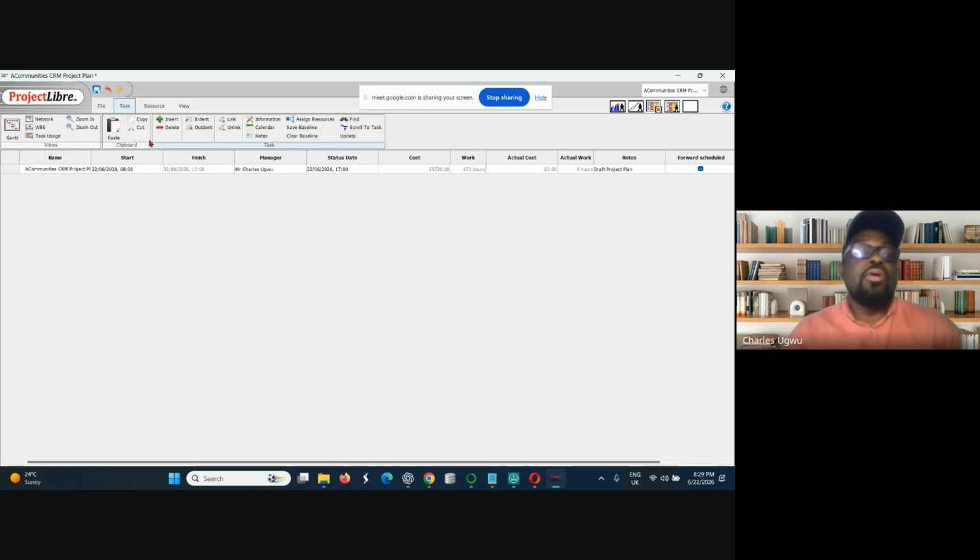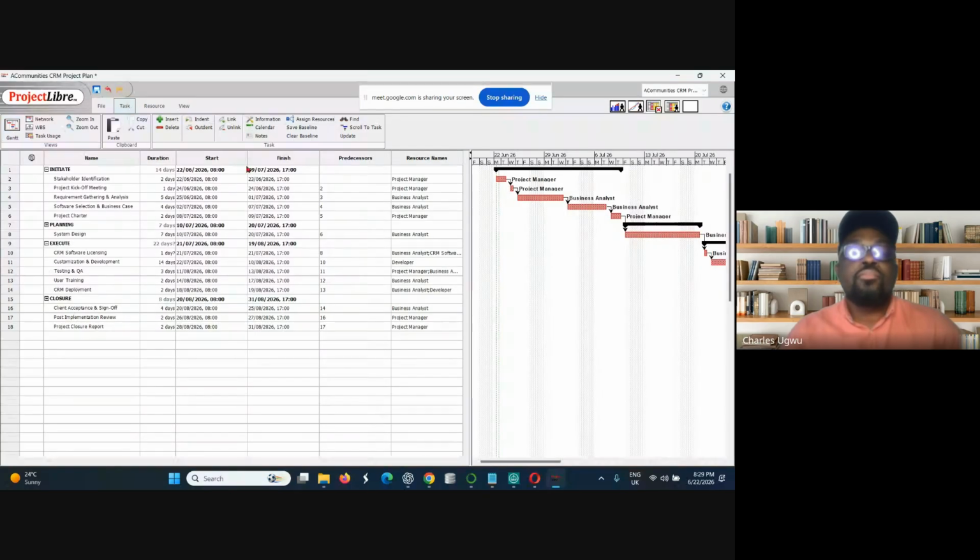This is where you are going to save your work. Come over here. You call it baselining. Once you finish this work, you baseline it. It means it's no longer a draft.